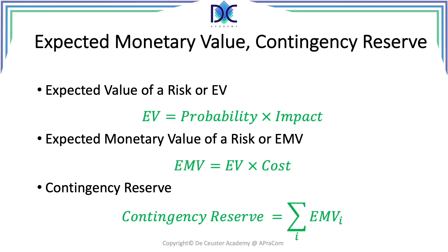The last element related to risk management is the calculation of the contingency reserve. This is by definition the sum of all expected monetary values calculated. An important item to note: when we look at the expected value or expected monetary value, we multiply the impact by the probability. But when the risk event actually happens, the actual impact will occur and the probability becomes 100%. In the two examples shown, when the risk events are occurring, the real delay will be 20 days with a total cost of $20,000 — not 6 days and $6,000.